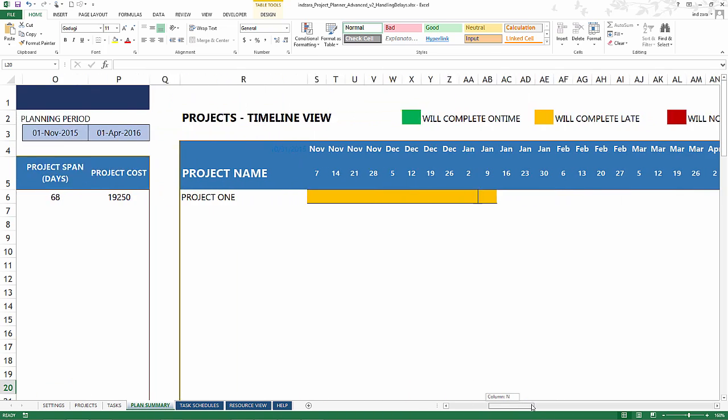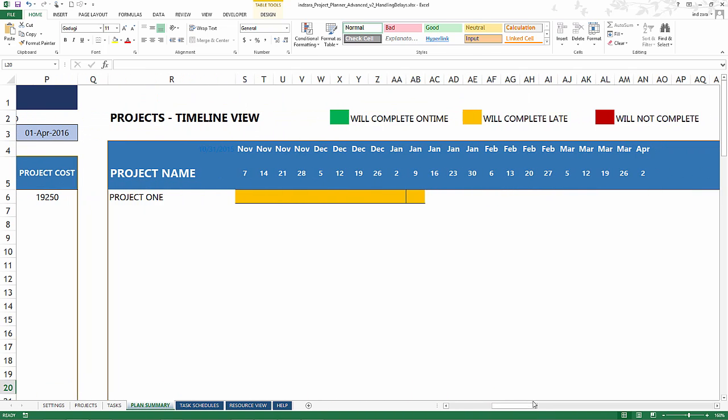The timeline view will also indicate the same, which is yellow indicating it's late. The thin line here indicates the preferred end date for the project and clearly this project is going to go beyond that.